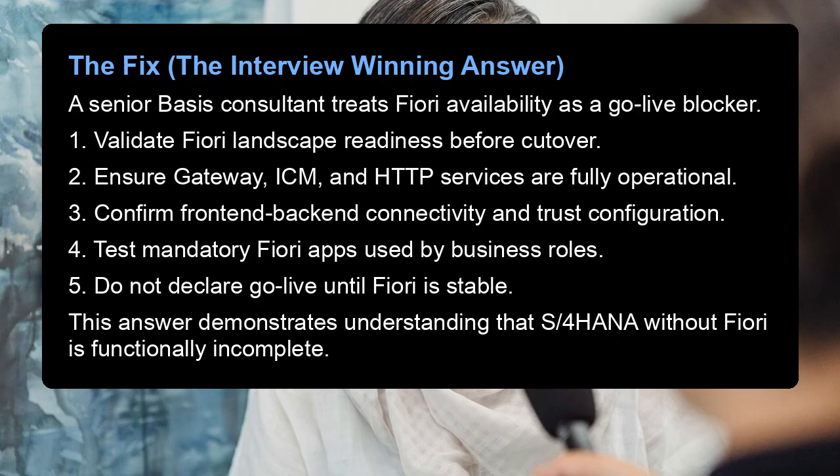3. Confirm front-end back-end connectivity and trust configuration. 4. Test mandatory Fiori apps used by business roles. 5. Do not declare go-live until Fiori is stable. This answer demonstrates understanding that S/4HANA without Fiori is functionally incomplete.